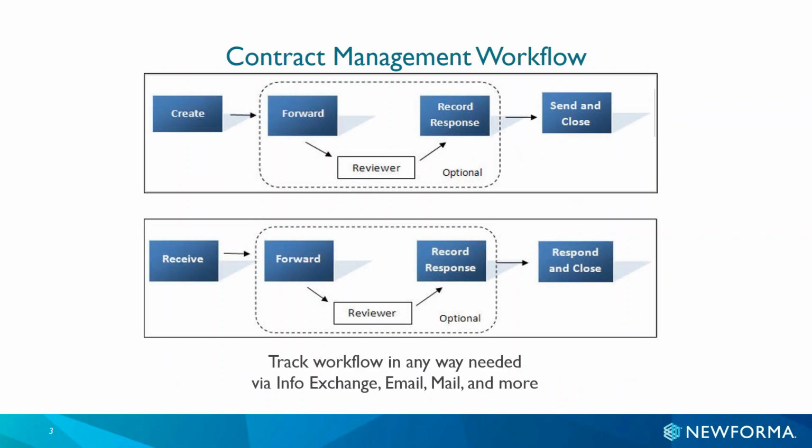And the two main workflows in Newforma are the create and the receive. So I'm either the creator of an item, if I was the one who was submitting a submittal, or I was the one with the question, and so it was my RFI, then I would be the creator of that item. Or if I'm receiving it from someone else, so if it comes in via email, which seems to be the case in most cases, or if it's something like shop drawings coming in and we receive those via email, then we can record them directly into Newforma.